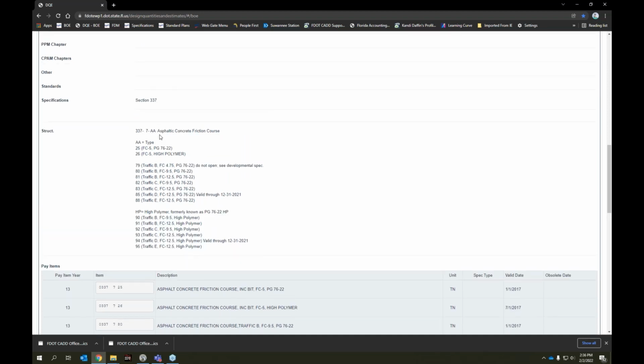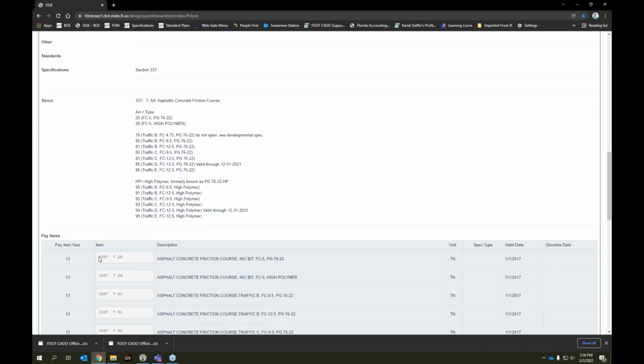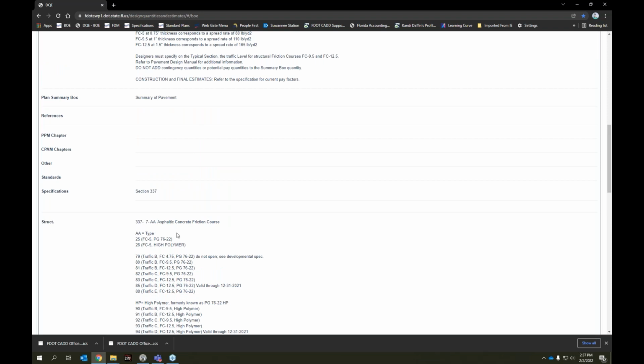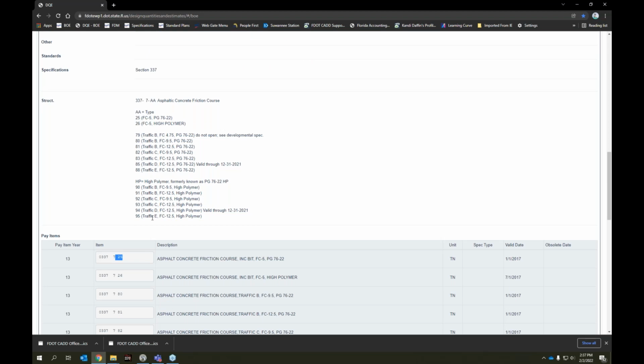So in this case, I'm looking at asphaltic concrete. There's the 3 separate sections of the number. The first section is 4 digits, the second section is 3 digits, and the last section is 3 digits. And in the correct format, you're going to have your leading 0 followed by your item number. Then you're going to have 3 digits. In this case, there's only 1 used, so it needs 2 spaces to hold that full format. And in this last group of 3, it only has 2 digits, so we have to put a space there. So make sure that you always have either 10 digits, or if the last group is unused, you can leave those off, but only if the last group is unused in this structure. Just make sure you use that format.